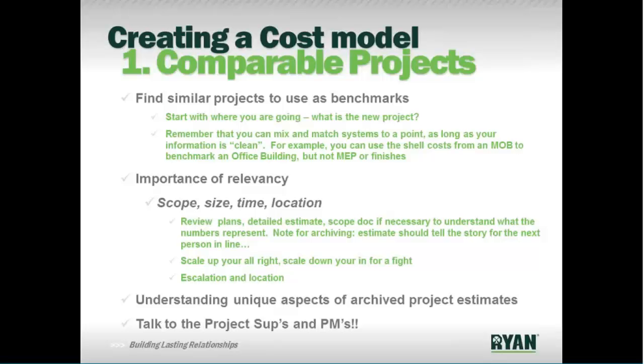Next point there, in terms of just establishing comparable projects, understand the unique aspects of an archive project. Did the project you're comparing to have a generator and UPS backup, or was there no backup? Some of those kinds of things can add swings of several dollars a square foot, and so you just want to be aware of them as you're using those for comparables.